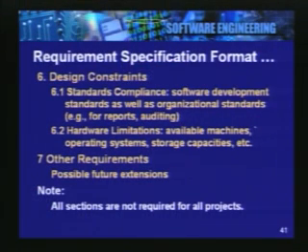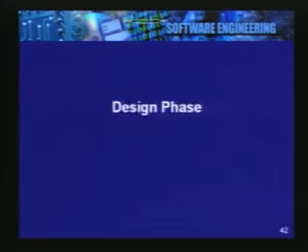We can define the platforms, we can define the capacities, we can work out the sizes required for the different systems and so on. All these must be possible from the SRS document, and we see that it is detailed enough to give us all this data. It is very important that the analysis phase results in preparation of such a detailed and standard document. So, we proceed further only when the document is accepted by the users as being complete in all respects. Once it is signed off, we proceed to the next phase, which is the design phase.